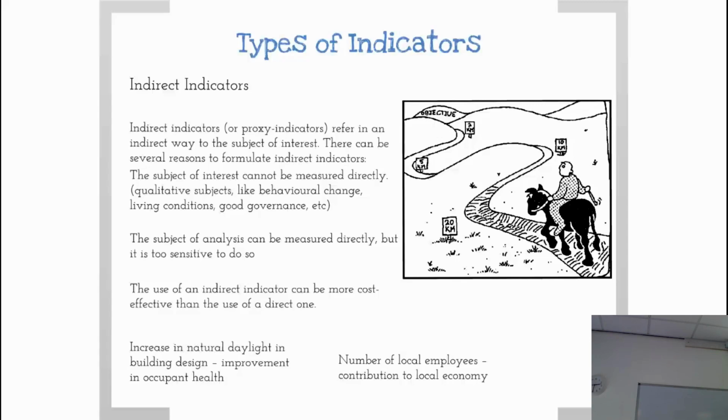Okay, maybe in the old days, you'd give it to the one who was cheapest. Maybe that would be the one in the southeast. But in today's new world, we would give it to the one that creates the most value generally. So the guy in the northeast might be more expensive. However, they're keeping that spending within the local economy. Therefore, we could say, well, in terms of social inclusion, social economy, local economy, we're creating value. So therefore, we're creating more value than we would if we used a cheaper guy. It's hard to do that, but that's the kind of thing we're moving to nowadays. Cost is no longer